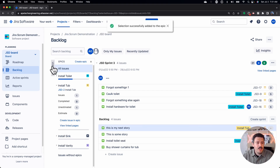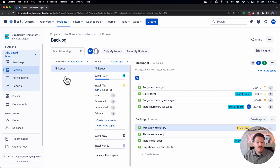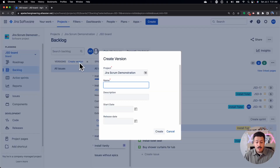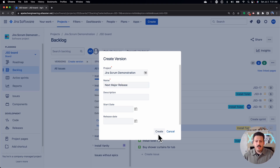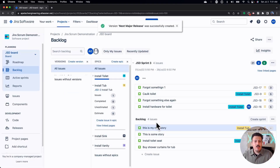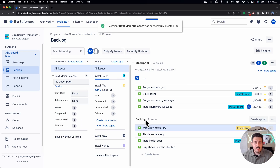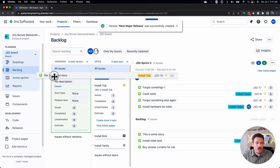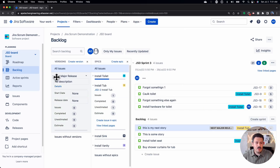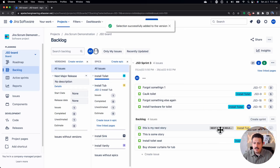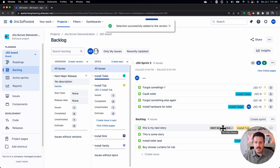If you have a release, you can definitely create a release — a next major release — and put some dates associated with it. Once you have those releases created, you can drag and drop that story into that release, and you'll notice that it now belongs to a release.